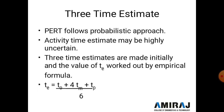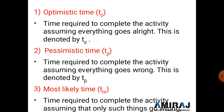Using these three values in the empirical formula, we get the estimated time te. The formula is: te = (to + 4tm + tp) / 6. This is the formula for the three time estimate.